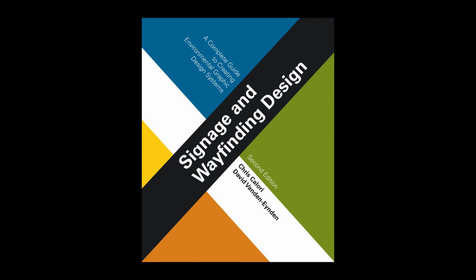The documents that work together to convey this design intent include sign location plans, message schedule, design drawings for the sign graphics and hardware, and specifications. Note that work on most of these documents was started in the design development (DD) phase, and that the documentation phase is aimed at filling in and finalizing the information contained in these documents to provide fabricators with a complete picture of the sign program's design. See Figure 2.26.